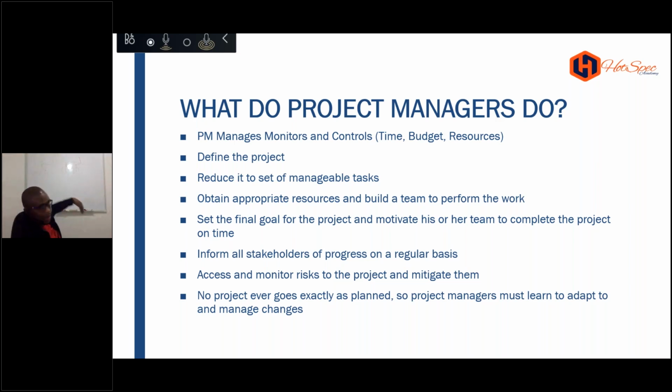My work breakdown structure is hierarchical. It tells me the project objective, and the project objective is broken down into a set of stages. Each stage is broken down into a set of tasks. Each task might still be broken down as well. So you're going to have a flow down, and that constitutes my work breakdown structure, which eventually becomes my project plan. I'm going to show you that. I'm just giving you an eye opener of what you should do. You break it down, reduce it to a set of tasks.